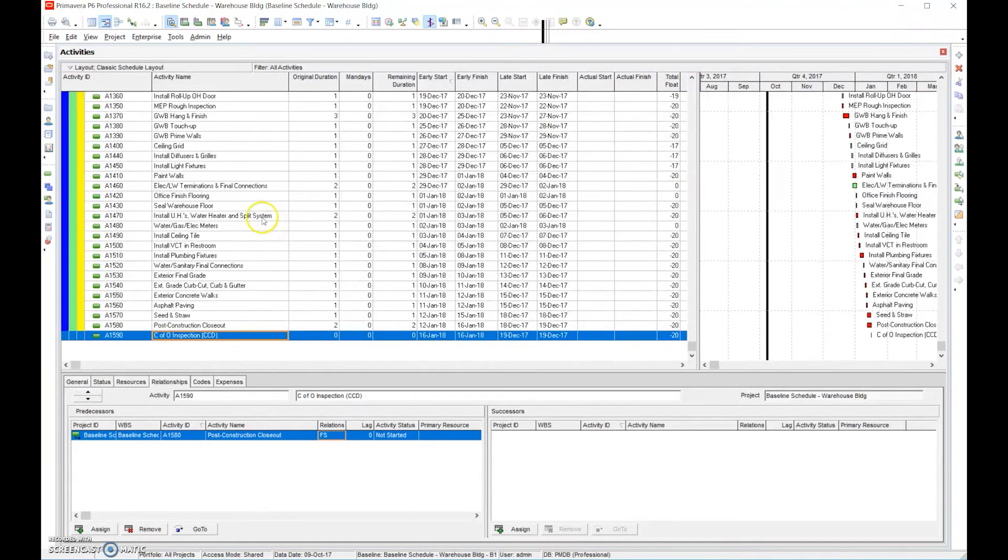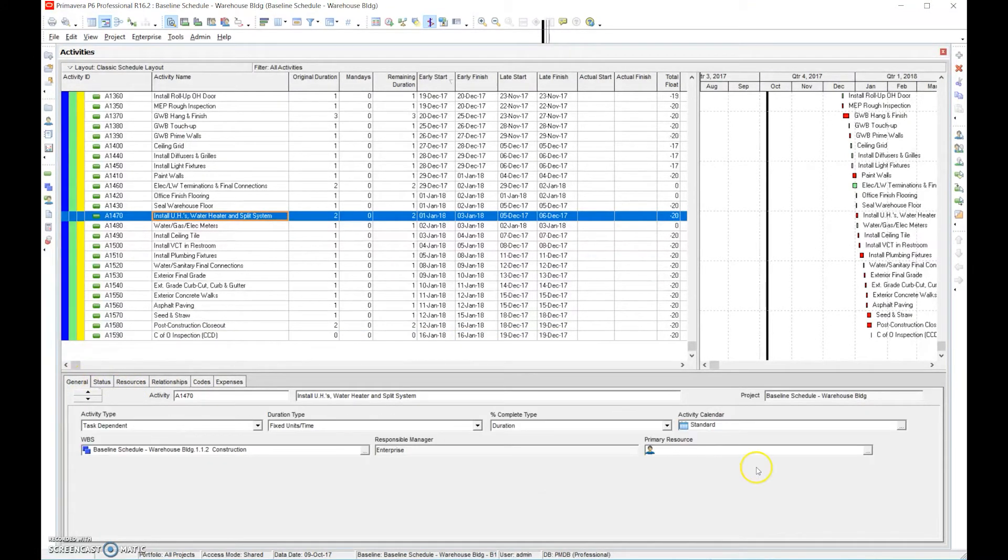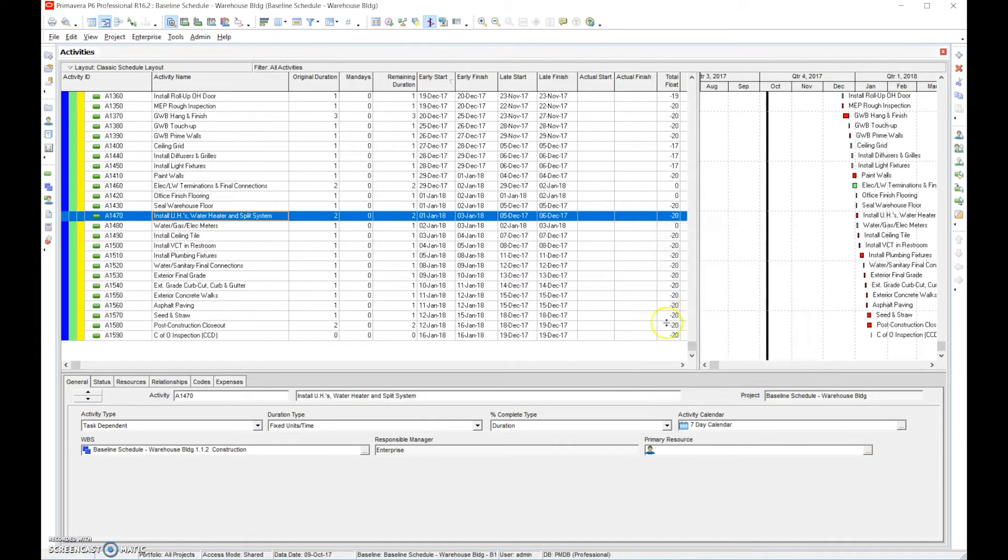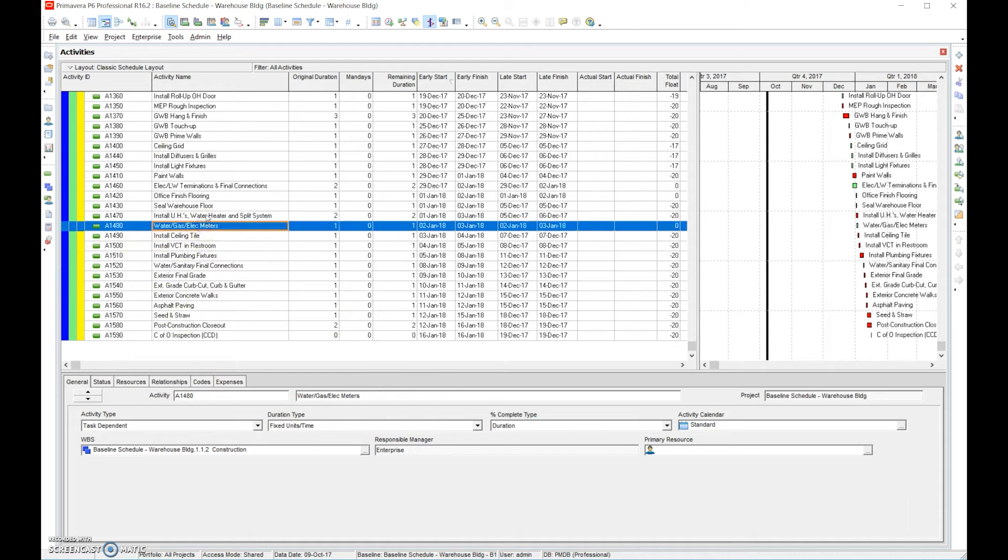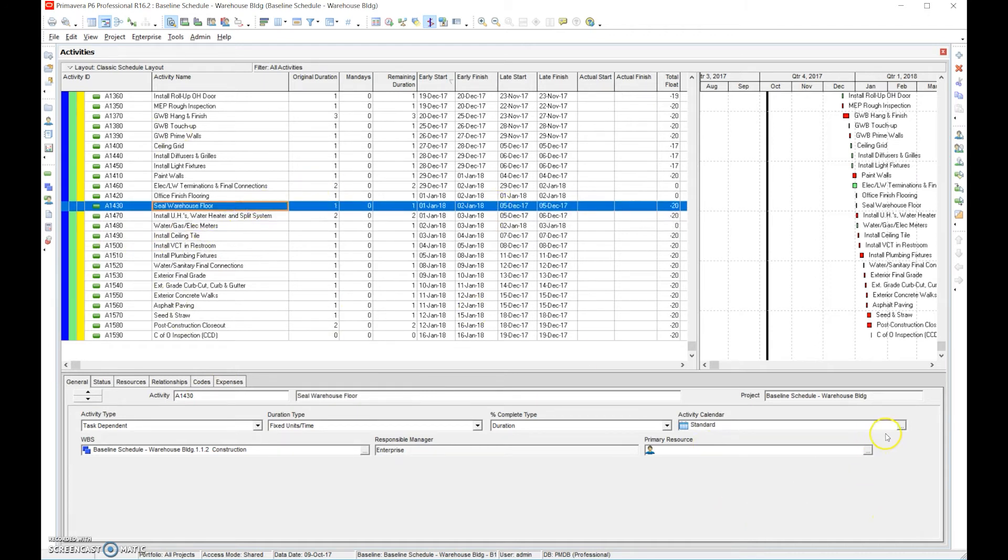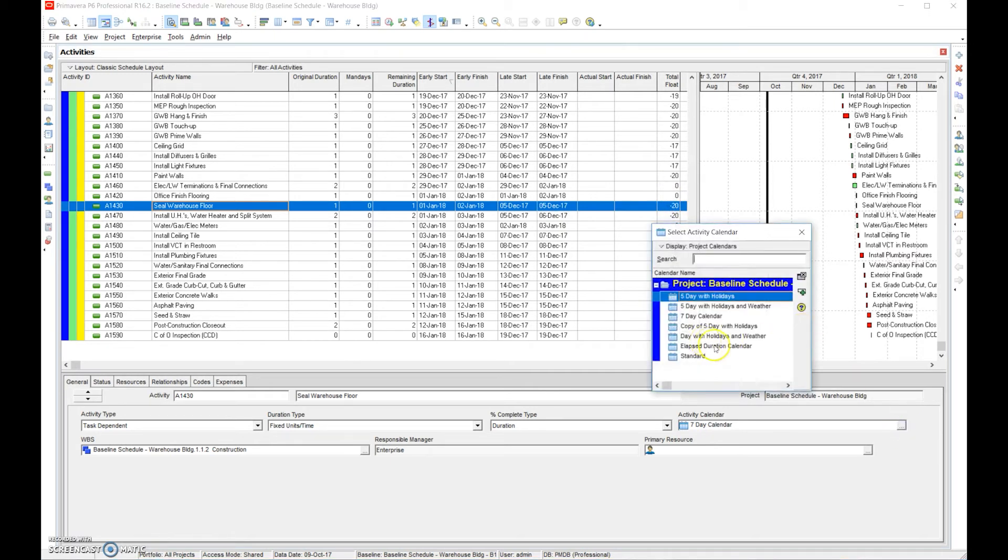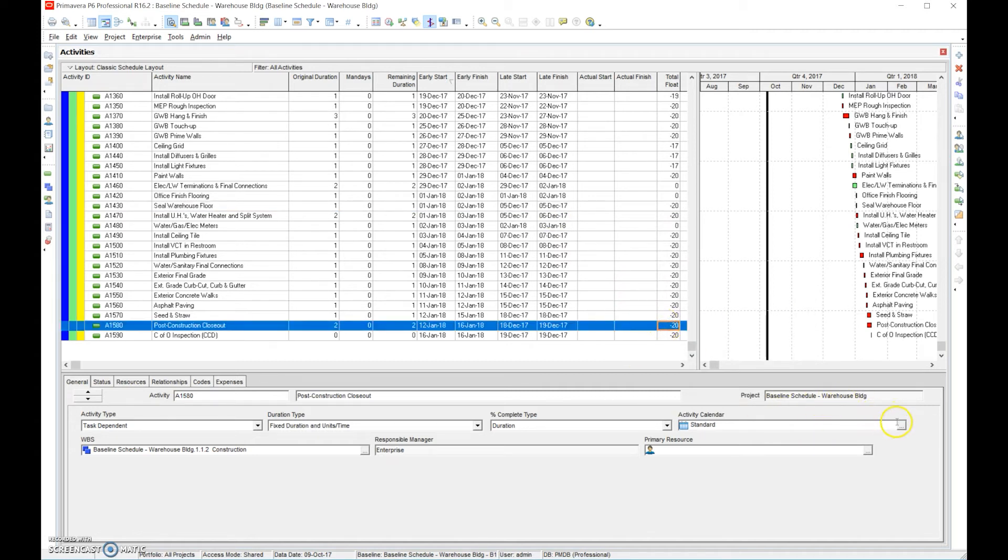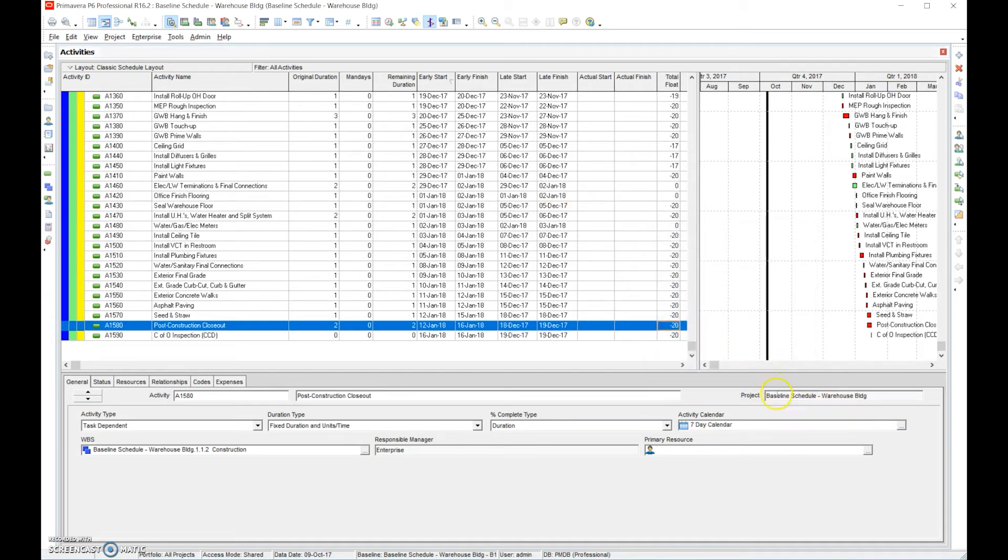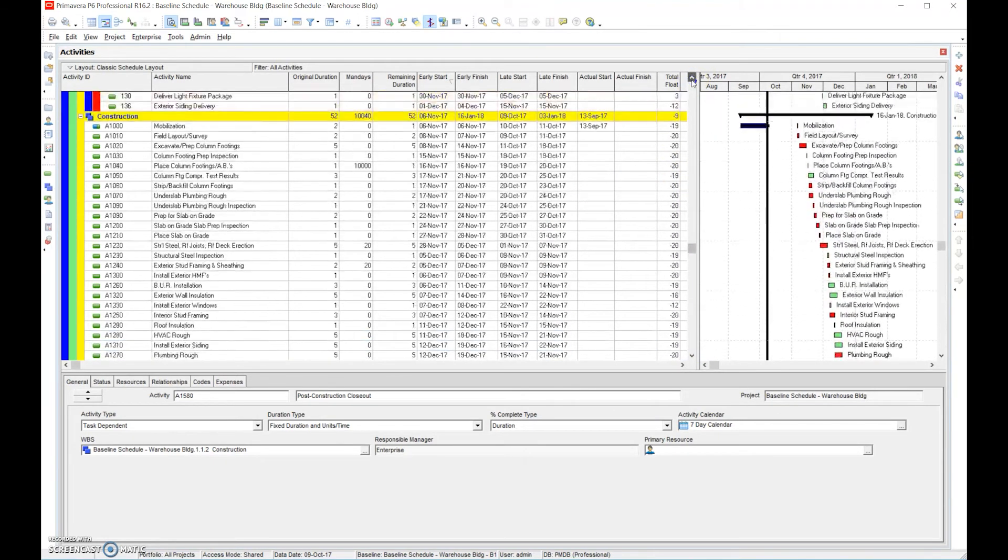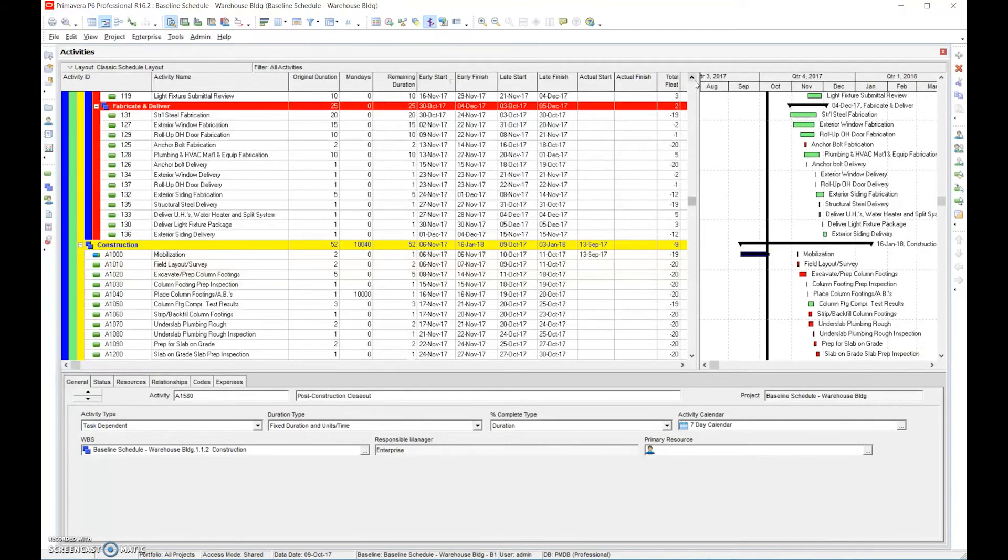One thing I didn't mention, I talked about additional resources, but what if we also increase the availability? What if we go through and we change the calendar to being a seven day calendar? And if we do a seven day calendar, that could increase our availability there. In that case, it didn't increase our availability, but we could do that and try to increase availability, and by increasing the number of days, people can work. That's really helpful on activities that have weather involved with it. So that's another thing we can do is we can change the calendar around to increase availability of resources, not just increase the resources, increase the availability to them, allow them to work overtime or work more days a week.